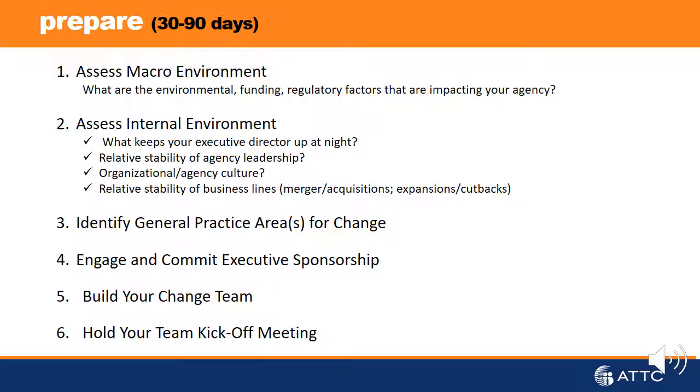The first stage of the model is preparation. Lasting anywhere from 30 to 90 days, the major activities during this phase include assessing both your external and internal environments, identifying general practice areas for change, engaging executive leadership sponsorship, and engaging the coworkers and colleagues that will comprise your change team. The preparation phase is completed when the facilitator holds a change team kickoff meeting to facilitate cross-team shared learning and change team project planning, design, and commitment.